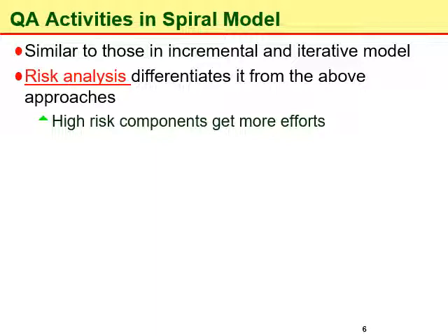However, the minor difference is typically that it has a risk-focused approach where risk identification and analysis plays an important role. The risk-centered approach leads naturally to emphasizing more on the areas that contain high risks. That's why this model is preferred for projects that are large in size and complex in nature.